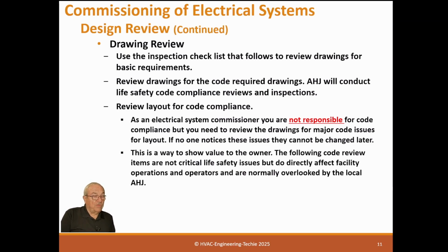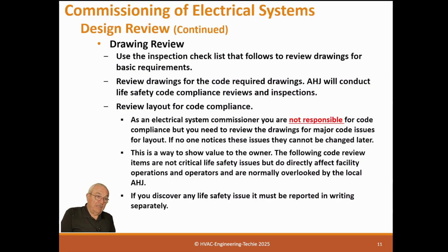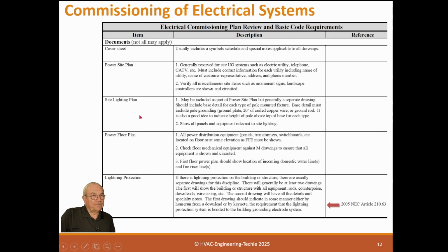This is a way to show value to the owner. The following code review items are not critical life safety issues, but directly affect operators and operations and are normally overlooked by the local, just what I said. So we want to make sure we look at those. If you discover any life safety issues, it must be reported in writing separately. This is not just in design review, but even when you're out in the field. Never put a life safety issue in an issue log because it's something that needs to be addressed immediately, so you do it with separate communication.